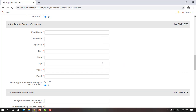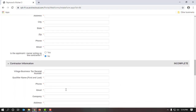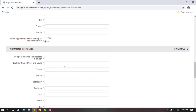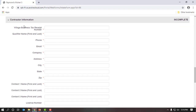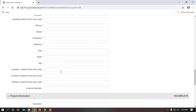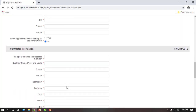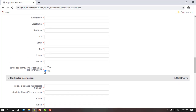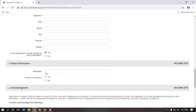Now we are at the applicant and owner information. There's an important question at the bottom: Is the applicant/owner acting as the contractor? Right now it's defaulted to no. If I hired Smith's Contracting Service to build the outdoor kitchen for me, I would be required to enter their tax number, first and last name, company email, phone, and license number. Being that I am building this outdoor kitchen myself, I'm acting as my own contractor, so I will select yes. This removes the additional contractor information fields.